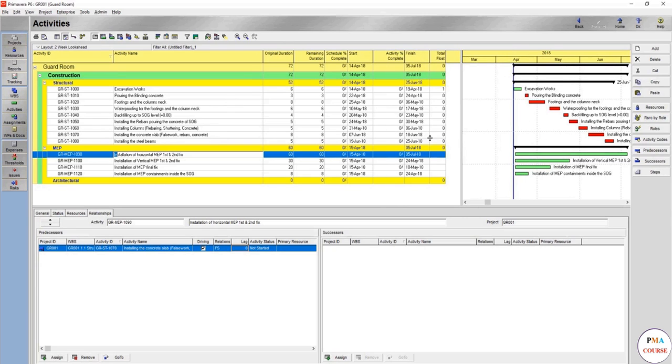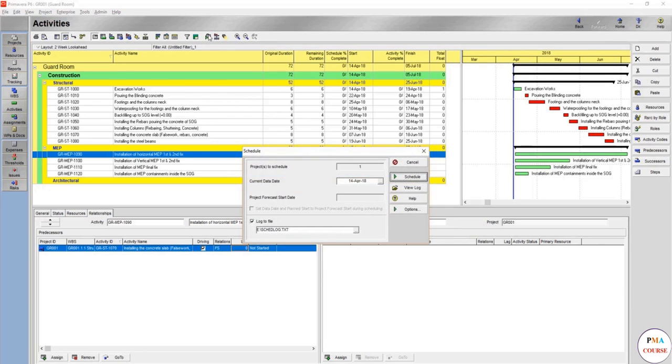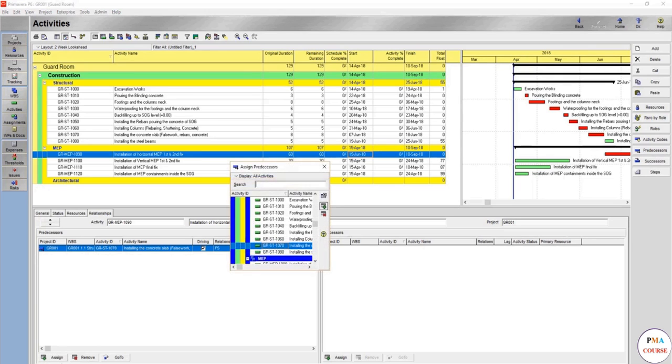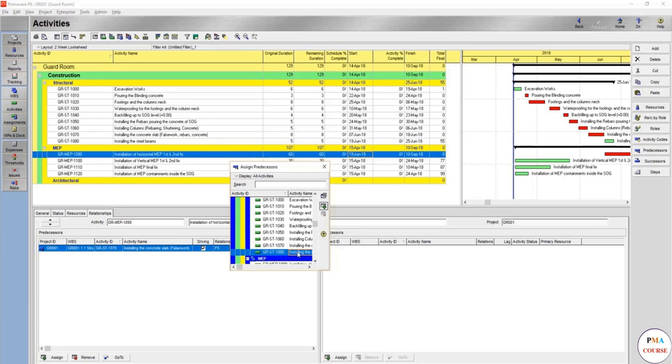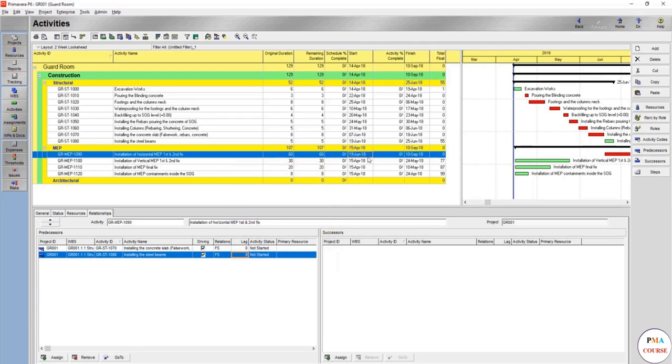Let's run first to see this one. It starts at 19 June and finishes at 25 June. Remember that this one will start at 25 June when you run. So this one is 19 June, directly after the concrete slab. But you want also to make it after the installation of the steel beams. You'll press Assign, Assign Predecessors, and you'll install 1080, which is the steel beams. Now it will come at 26.